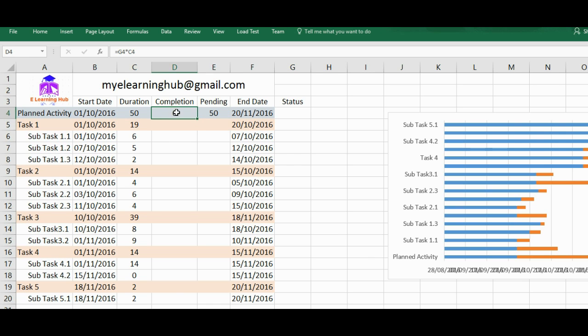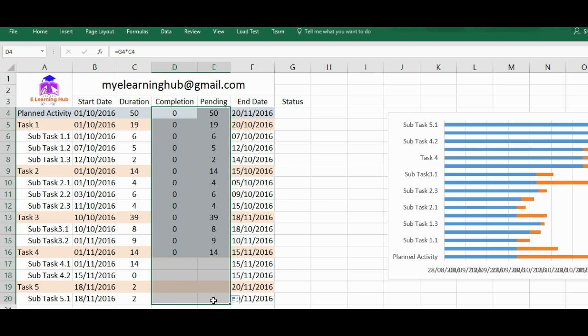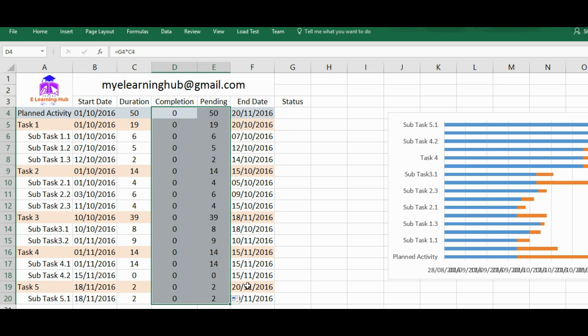What's pending is equal to duration minus what's completed. Just enter, just copy down this formula for completion chart. Then we are done.